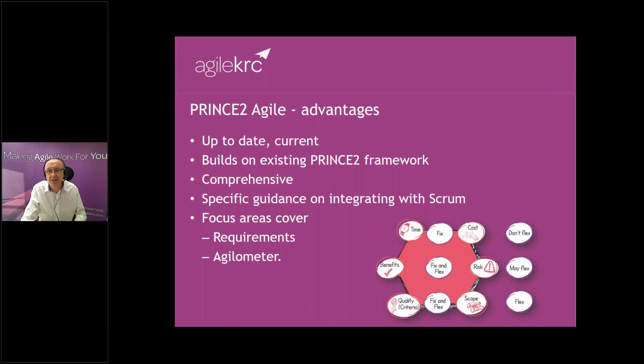User stories, a classic agile technique that everyone says, oh, write a user story. Give it to the project manager, give it to the product owner, write some user stories. Very easy to say, very hard to write really good user stories. My favorite user story of all time was out in India, where I'm in a room with 15 developers trying to code from it, and it says, as a branch manager, I want to manage the branch so the branch is managed effectively. Now, that's a really good example of you've written a user story, but it's not actually written that well. So there's a lot of guidance on how to write things like user stories and acceptance criteria as well.